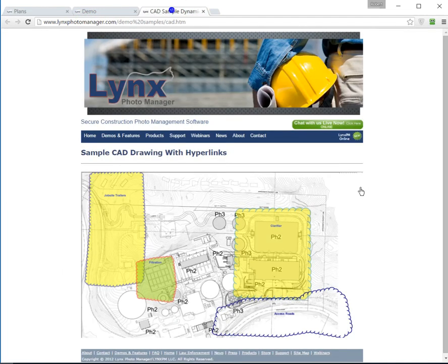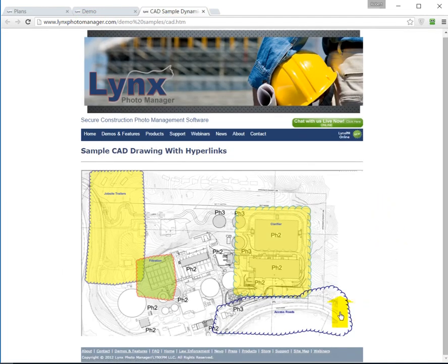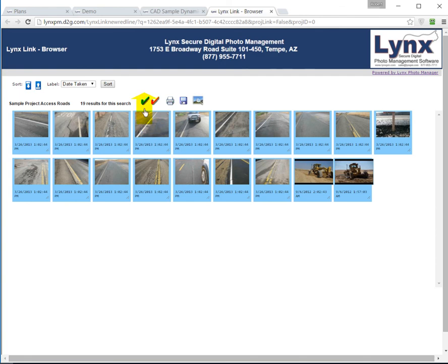Secure visual documentation is critical for your construction projects. For example, we had a client where they were going to be back charged for all of the damage along the roadway to their project. They had the foresight to take pre-construction images of the roadway and was easily and quickly able to show that all that damage had occurred prior to them even breaking ground. So that's a good example of where secure visual documentation can get you out of a claim or litigation situation immediately, whereas written documentation would have been subject to interpretation.